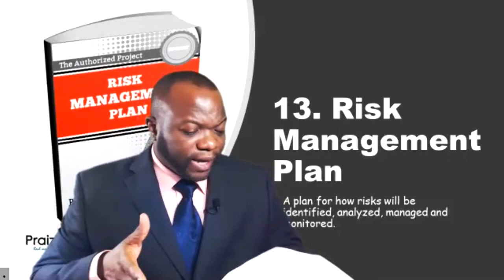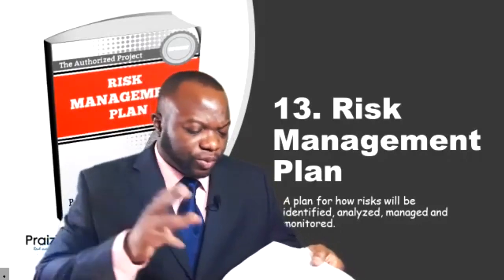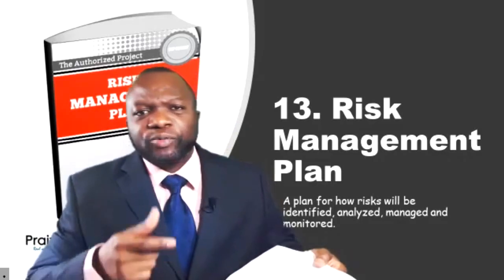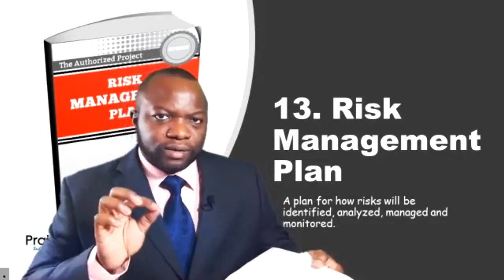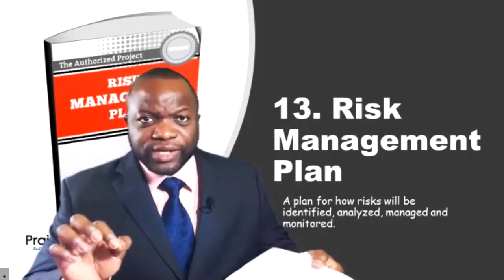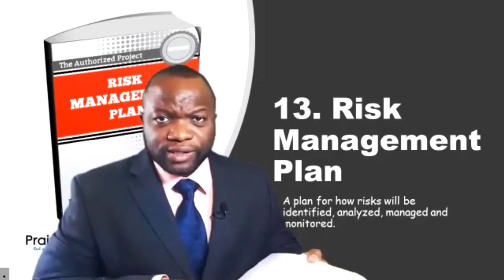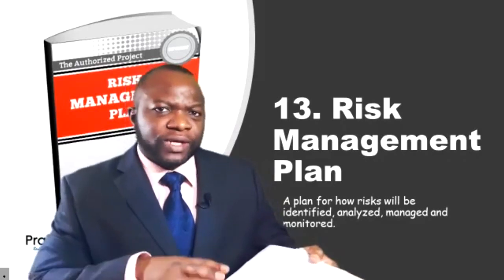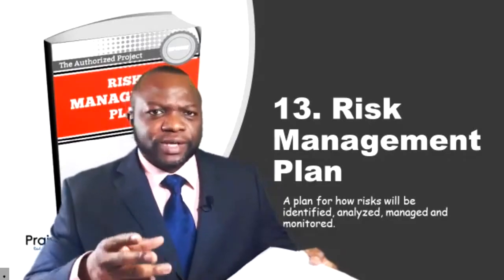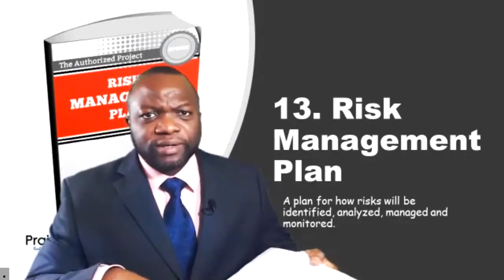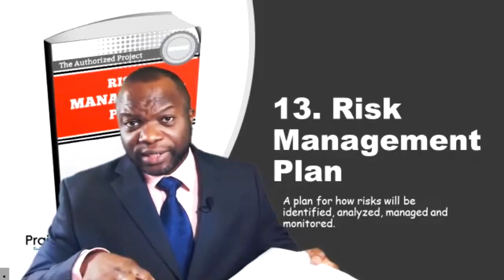The next page, we have the probability and impact matrix, which takes those definitions, puts them into a matrix, and it's a rapid way for you to identify a risk score. The probability and impact matrix have probability ratings and an impact rating, and multiplied, these give you a risk score. All of this should be addressed in the risk management plan. So you can see why it is a massive document and it needs careful consideration by way of the possibilities.